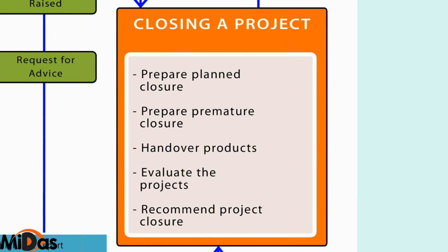Now you have another version of the project plan which is on actuals. Now you compare both of them. You evaluate where you stand from where you started. Similarly, for the business case, for the benefits, for the cost, for the time, all these things, to evaluate the project performance. How did we perform in the project? And after doing all this, you recommend the project closure.